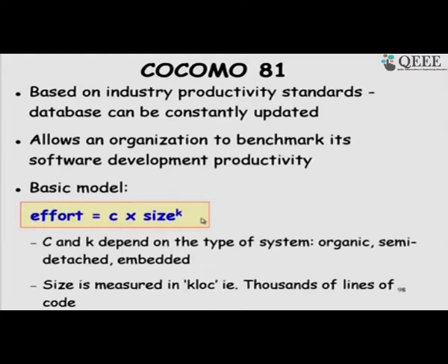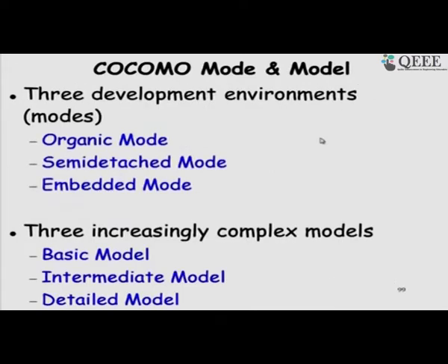It is a very simple expression: effort is determined by the size, and there is a multiplier, an adjustment factor, and K is called a scale factor.